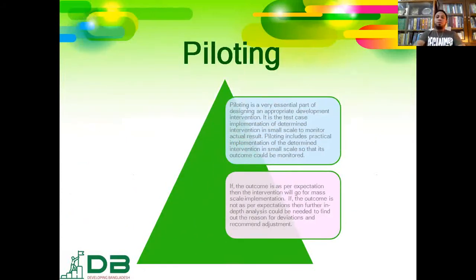So after determining the project proposal, we need piloting. That is implementing the proposals on a limited scale to evaluate and get their results. Piloting is a very essential part of designing an appropriate development intervention. In case of testing or piloting, if any fault is identified, we can take corrective measures.